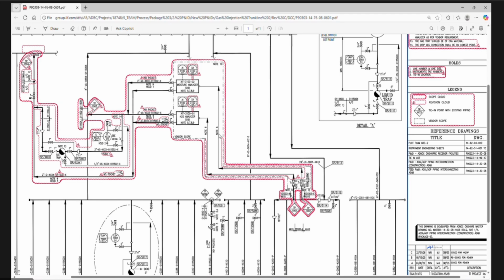Before that, we have a pressure reduction facility, and the pressure is still not finalized. It will be as per the vendor. The vendor will tell us how much pressure is required for the H2S analyzer and moisture analyzer. Only then can we finalize the pressure of the skid.